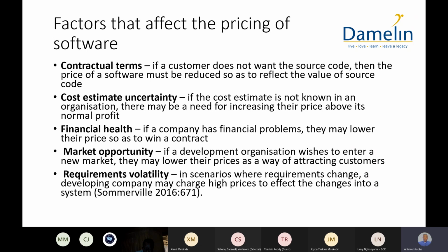If you are the client and you tell the service provider that you need this project done and you need them to deploy the solution for you, but you're not really concerned about also acquiring the intellectual property or the source code used to build the project. So they build it for you and they deploy the solution, but they keep the code to themselves. That will make the cost of the software actually cheaper, because you're not buying the intellectual property altogether. Okay, you just want something built and deployed so that you can use it.